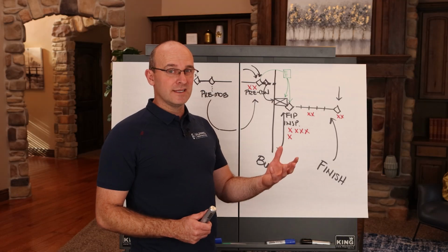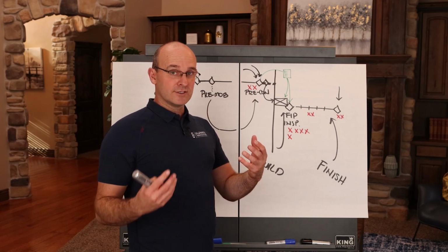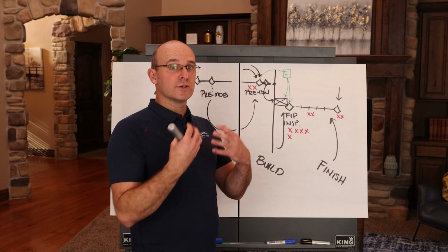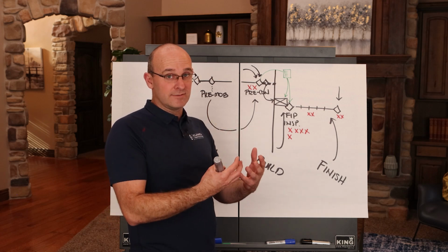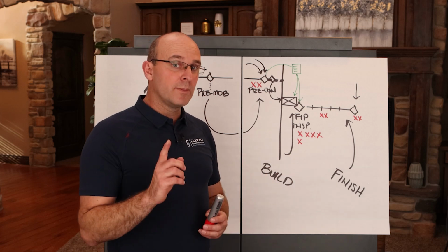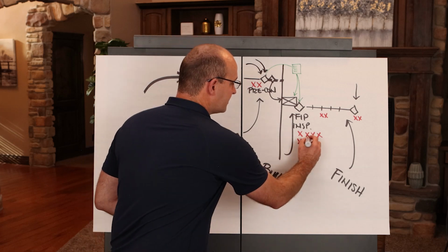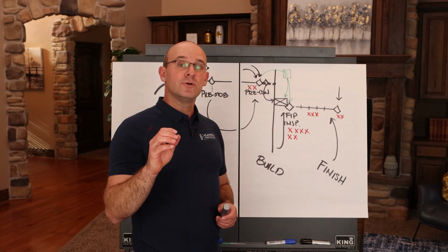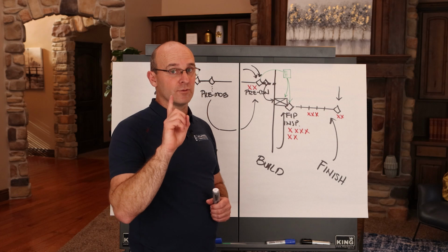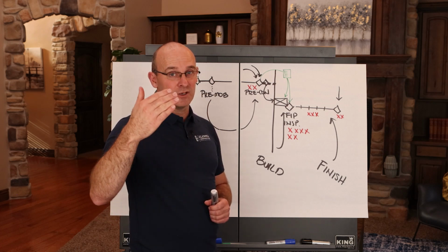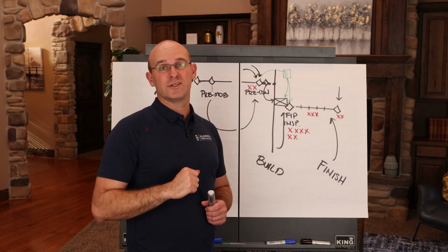So if there is a version of the design that was installed and there's actually a bulletin or an ASI or an addendum or something that changed the design and the crew maybe didn't know about it, you will pick that up in the first in place inspection and in the follow-up inspection to verify that they're working off of the right version of the information and that whatever they're installing is the most up-to-date according to the design.